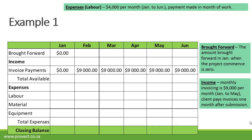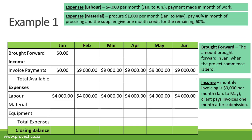On the expense side for labor, it's $4,000 per month and payment is made in the month of work — therefore from January to June, the payment is $4,000 per month. For material, we procure $1,000 worth of material per month from January to May. We pay 40% in the month of procuring and the supplier gives one month credit for the remaining 60%. In January we only need to pay $400. In February we pay the remaining $600 plus $400 for procuring in February — that's $1,000. The same applies for March, April, and May. In June, we only pay the $600 credit from May.